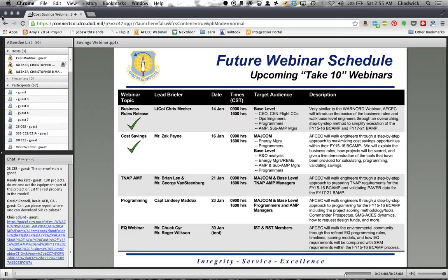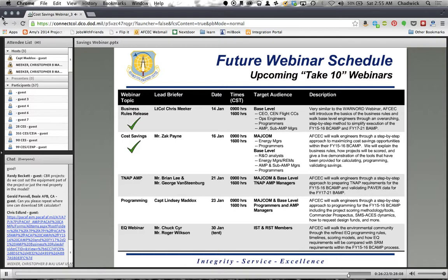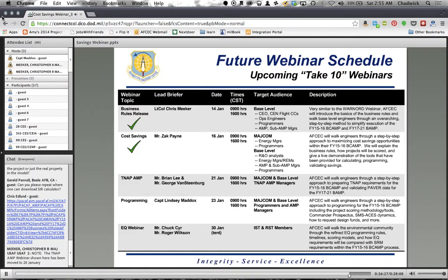My answer to that would be, what are we paying for? For example, is this maybe some flight simulators where we're providing infrastructure support? If that's the case and we're not buying the equipment, as it's being purchased with 3080 money, I would not include that in our requirement. Just include the real property piece that we're actually funding and doing internally.